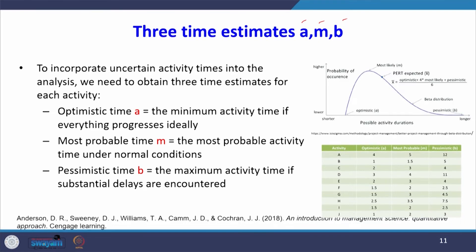The third time estimate is pessimistic time B: the maximum activity time if substantial delays are encountered. These three time estimates follow the beta distribution. The minimum time is optimistic time A, the longest time is pessimistic time B, and in between is the most likely time M. On the x-axis is possible activity duration and on the y-axis is probability.